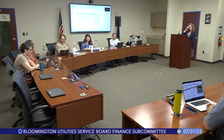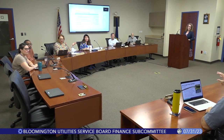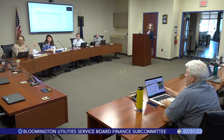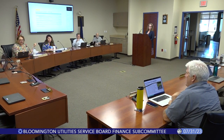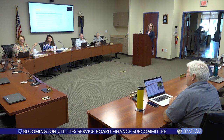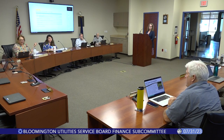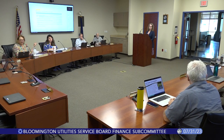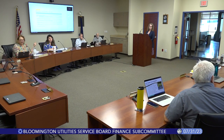What happened was we took the master plan that had the estimates in it. Then our engineering department has updated the numbers that were provided in the master plan to reflect the current market conditions and some other adjustments to the plan in terms of square feet. And then that's where that number was arrived at, and it includes contingency as well. Is Phil here? Phil, you can speak to that.